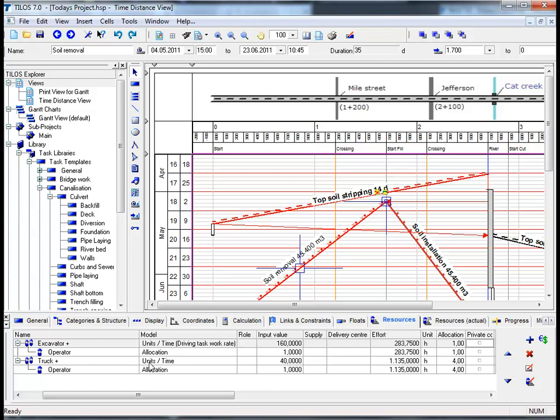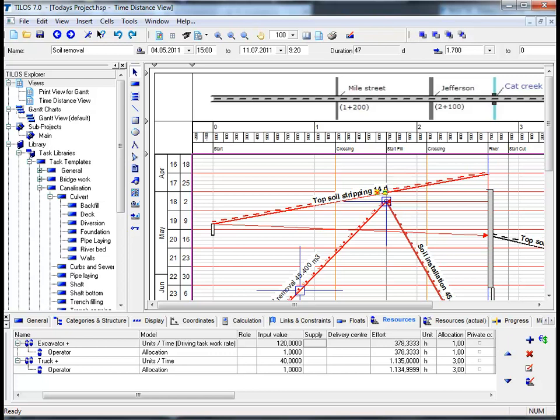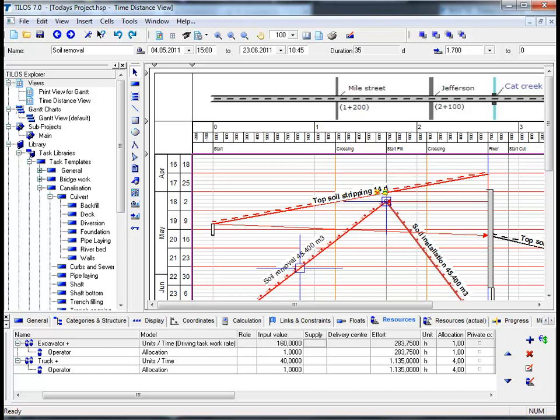Let's change some of the information to give you insight into how this all combines. If we change the input value to 120 cubic meters as opposed to 160 we can see after we hit the return button that we only require 3 trucks now. I'll change it back to 160 and you can see that due to the increased amount of cubic meters we will require 1 truck more, in this case 4.